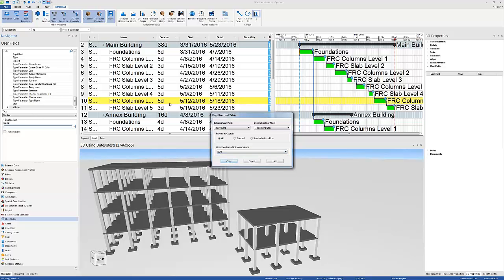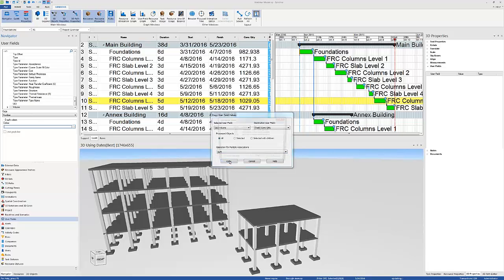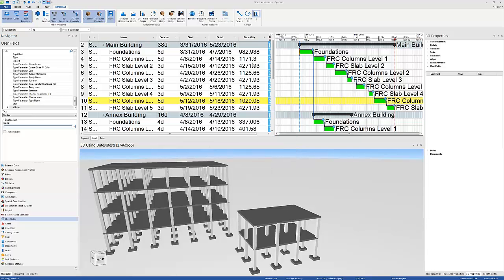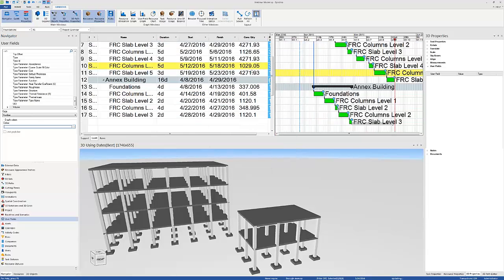For operations with multiple associations, I'm going to choose sum. This means that if many columns, or many footings, or many slabs are assigned to one task, Synchro will sum up the values from each of these columns and add them up to that task. And once I click copy, I populate all these values.